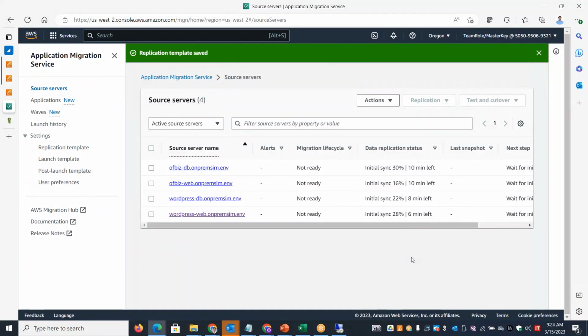But the actual time it takes to replicate the server or migrate the entire system from on-premises to the public cloud AWS platform depends on a case-to-case basis. The reason is it depends on the network bandwidth at the WAN level. If you're using a Direct Connect circuit, you have to find out how efficient it is. And if you're using a VPN solution, then we definitely have to do a pilot or a proof of concept to understand how much data traffic can happen at a particular time and how much time it takes to send a particular amount of data.